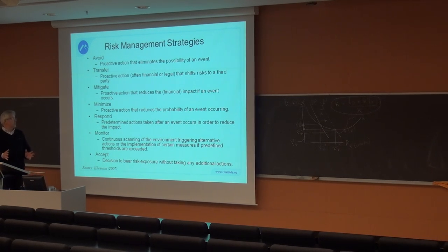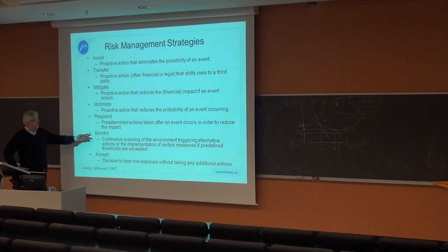But all these points have costs and benefits connected to them. So by having a sufficient amount of data, you can do a cost-benefit analysis to see whether you should care to monitor a specific factor, whether you should actually accept to live with the risk instead of taking all kinds of steps to avoid it. You can do a cost-benefit analysis to see whether you should outsource or buy an insurance premium to hedge against risk, and so on.